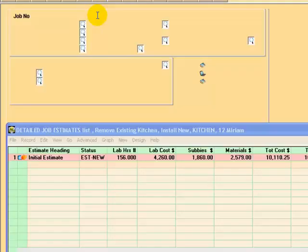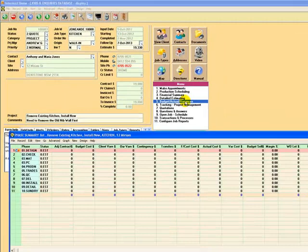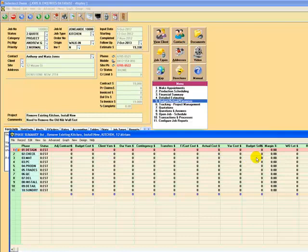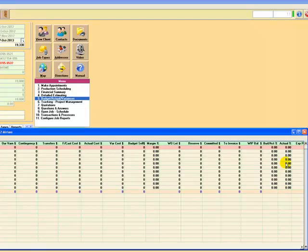Here's an example of one of several different layouts for your quotation — addressed to our client, job name, job number, dear Anthony and Marie, and some comments. Then we're breaking down the quote line by line, and one line can have up to five lines of comment. Page three has the totals, page four has our options, and the last page has the clauses appearing one after the other, with sign off for the salesperson or designer and a place for the client to sign as well. That's one example of a printed quotation. So that's the estimating and quoting side of the system. Here's where we can see when the job is won — those phase headings are copied across automatically, and we'd see the budget cost, then later the actual cost, the variance between actual and adjusted budget, variations to contract, what works orders and purchase orders have been raised, committed costs, what's yet to be invoiced, and work in progress balance.